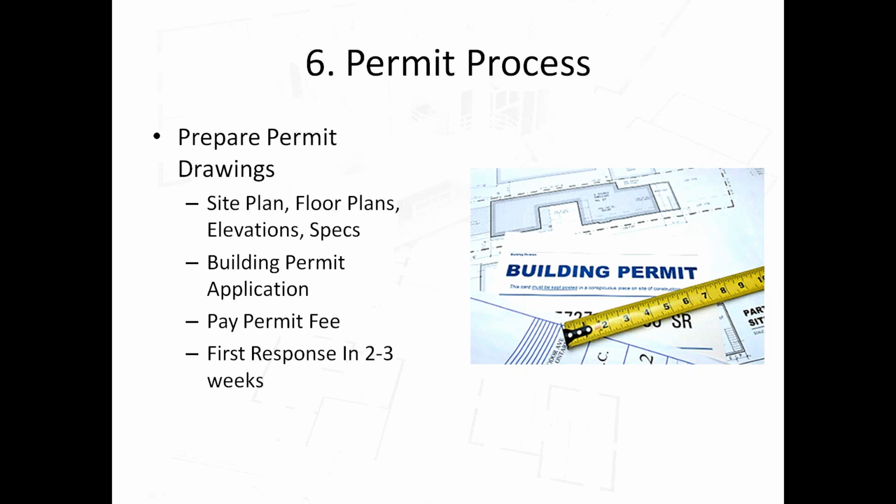Okay. And then you can expect a response within 2 to 3 weeks. Their mandate is 2 weeks, but sometimes for secondary units they'll say 3 weeks. And this is the time where they're going to come back and say there are a few missing items, and there always will be some things that are not fully accurate or that they interpret a different way.